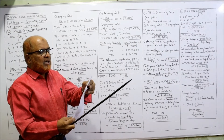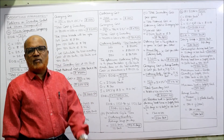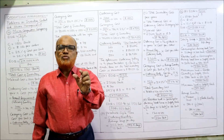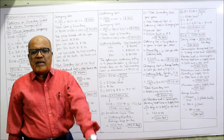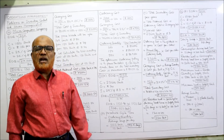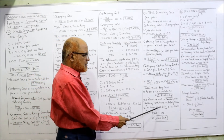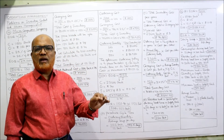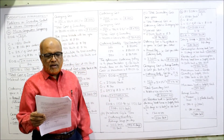If safety stock of 100 units is necessary, find the reorder level. Formula: reorder level = consumption during lead time + safety stock. Lead time is 10 days, daily usage is 12 units, so consumption during lead time = 12 × 10 = 120 units. Reorder level = 120 + 100 = 220 units. This is the end of problem 11.